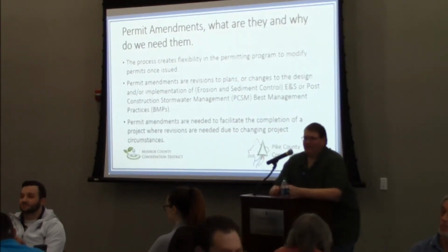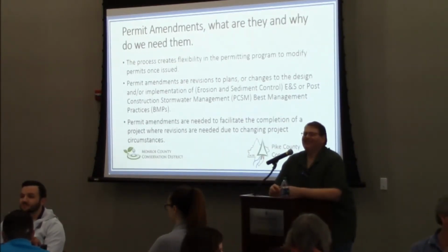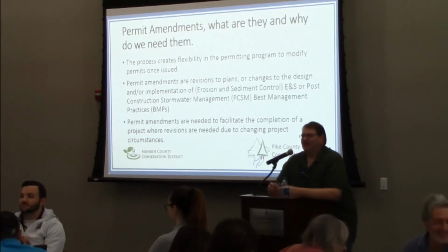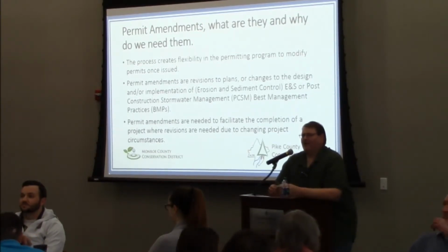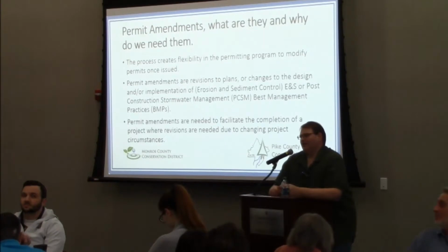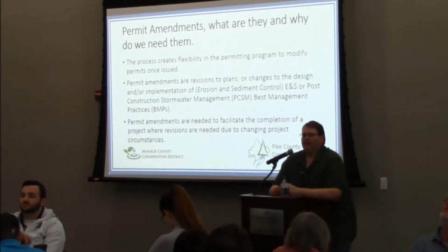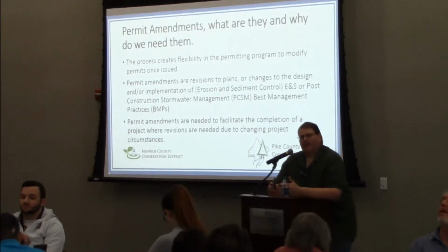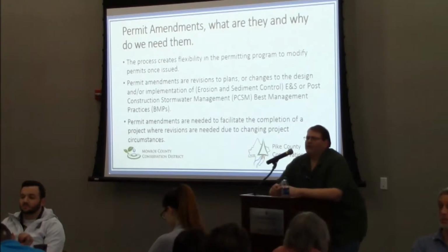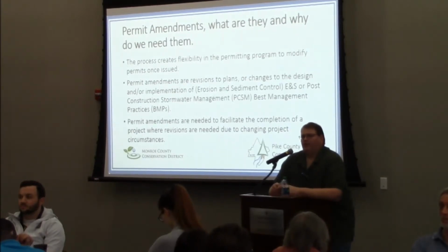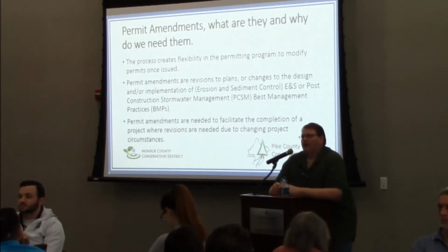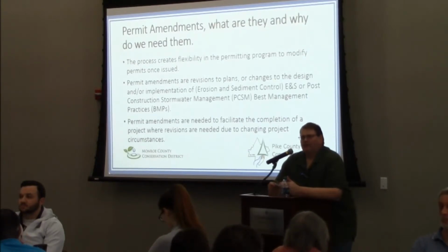So generally speaking, this never happens. You never get a chance to design and build a project without any changes once the permit's been issued. So what do the amendments do? It creates a flexibility within the system to allow changes after the permit's been issued. There are revisions to the plans or design or the implementation of ENS or PCSM controls after the permit's been issued.